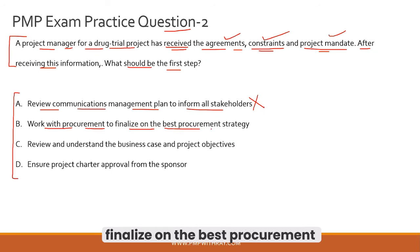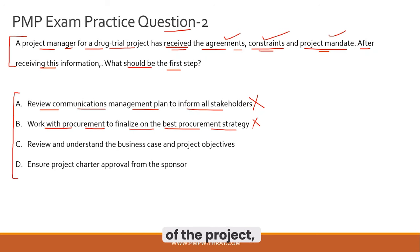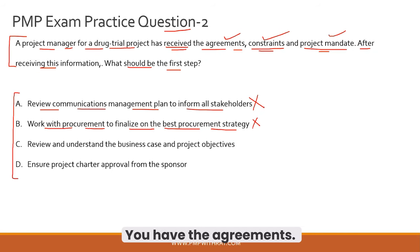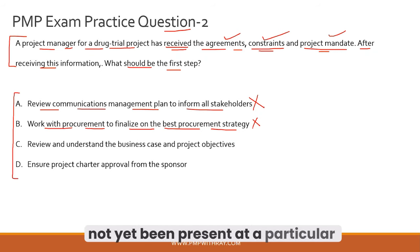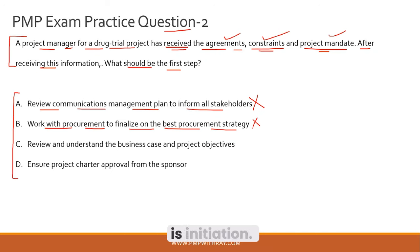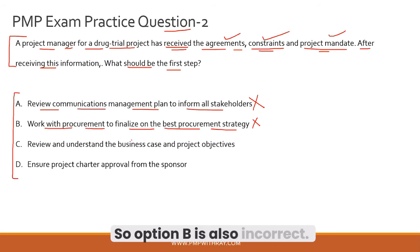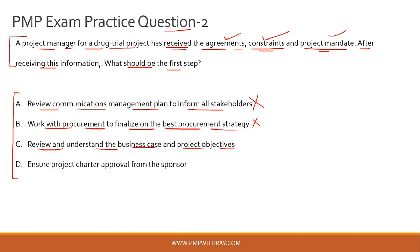Option B — work with procurement to finalize the best procurement strategy — is also incorrect. Finalizing procurement strategy is part of the planning stage where you develop the procurement management plan. We are still at initiation. This is another classic wrong answer choice directing you to consider something not yet created at the current project stage.